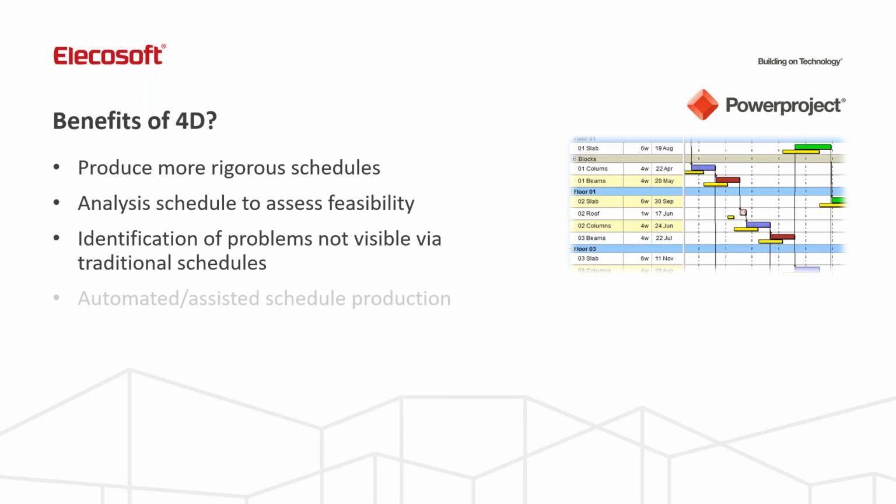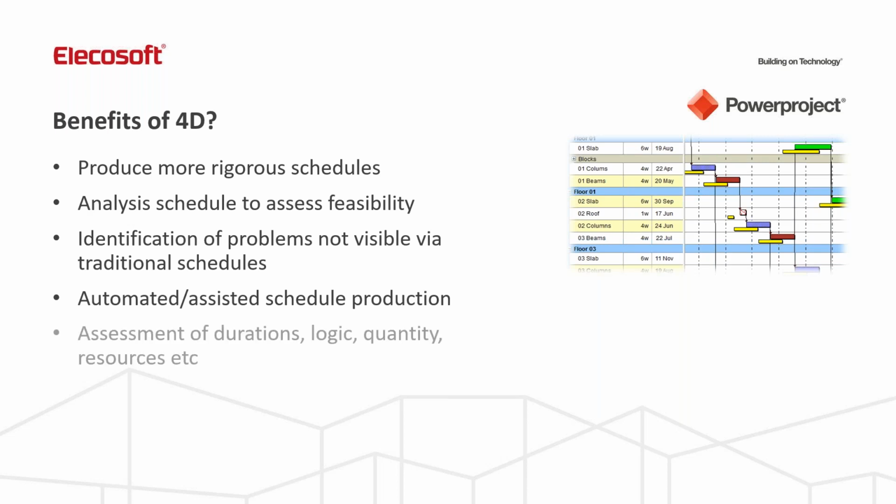But it could also be about actually improving the flow of the build site. So it could be that we're improving the management of the resources and the space we have available to us. So for example, in my sequence, in my activities, am I planning to have lots of work happening in one small concentrated part of the building, potentially causing conflicts between the resources, the labor gangs that are going to be working together, and therefore leaving parts of the site redundant?